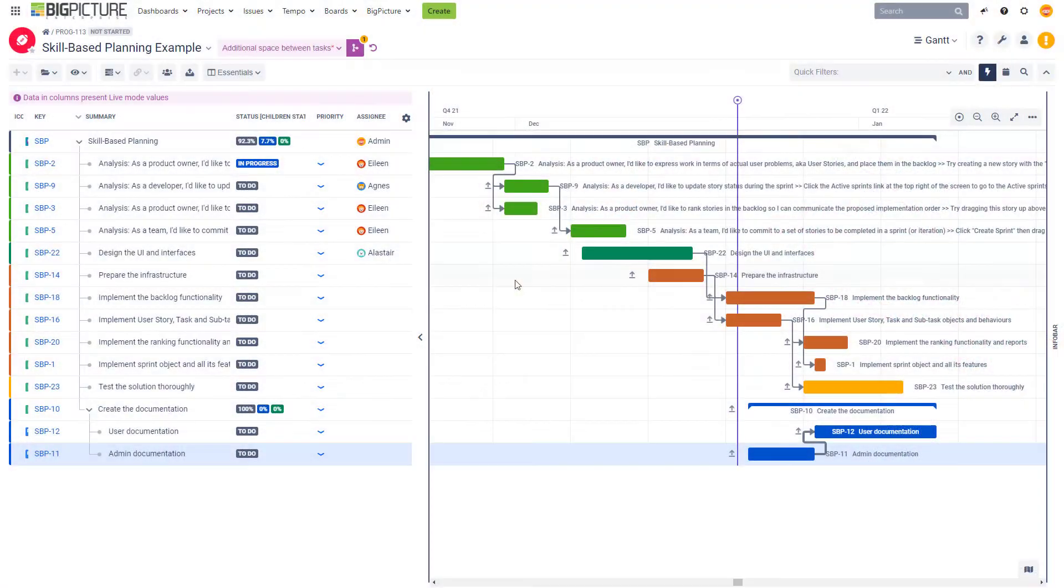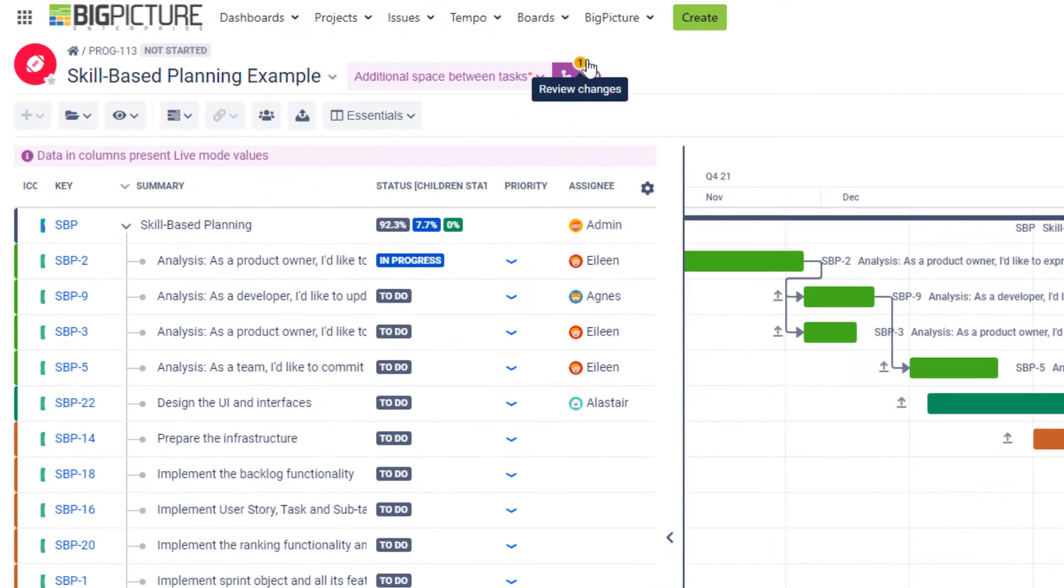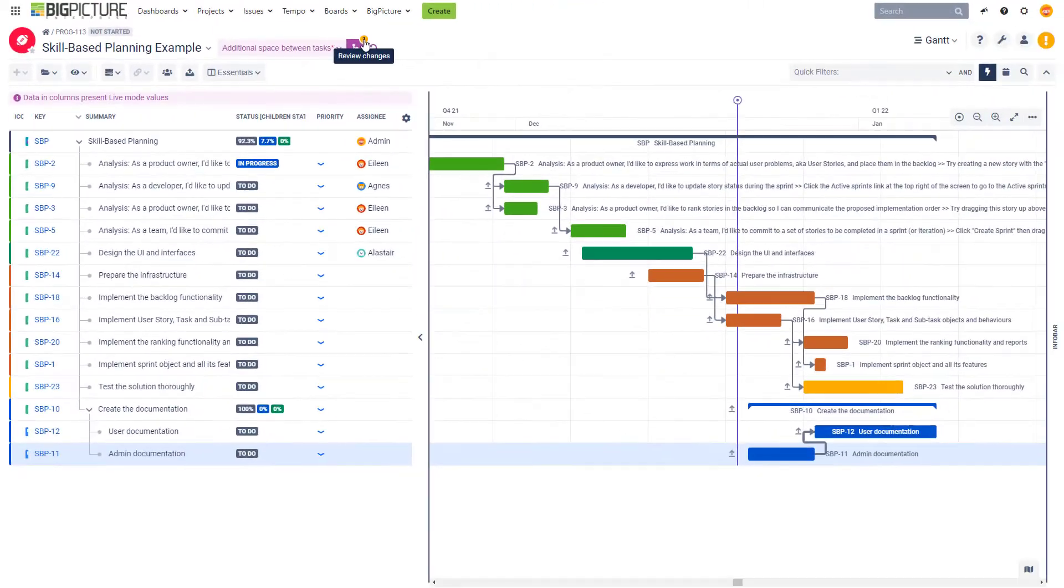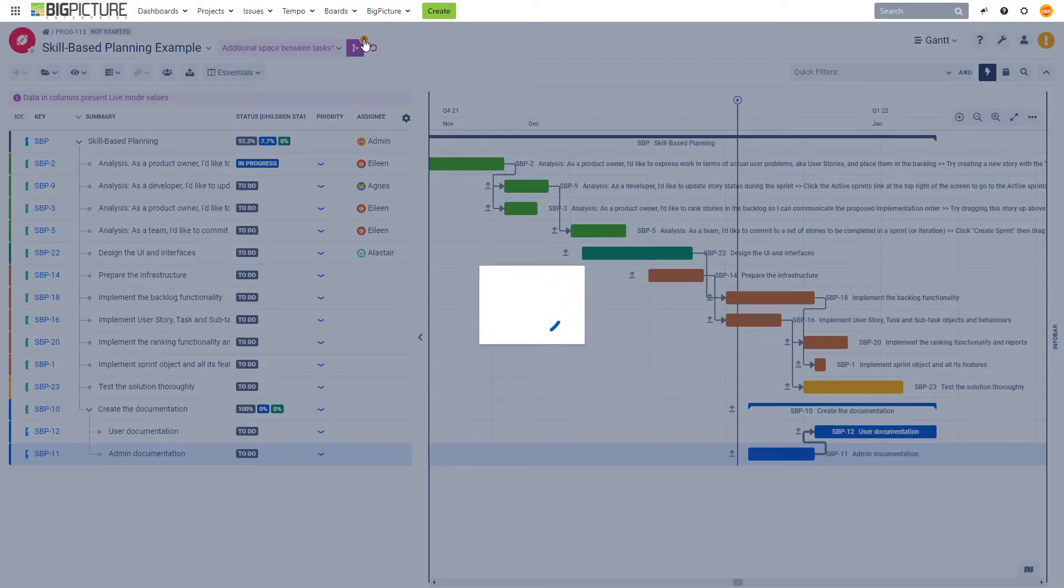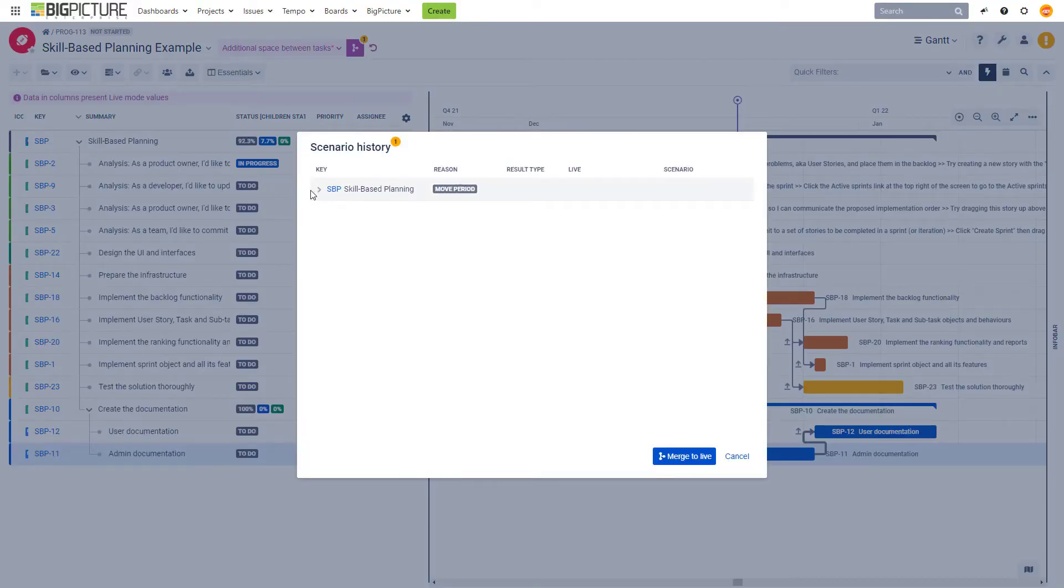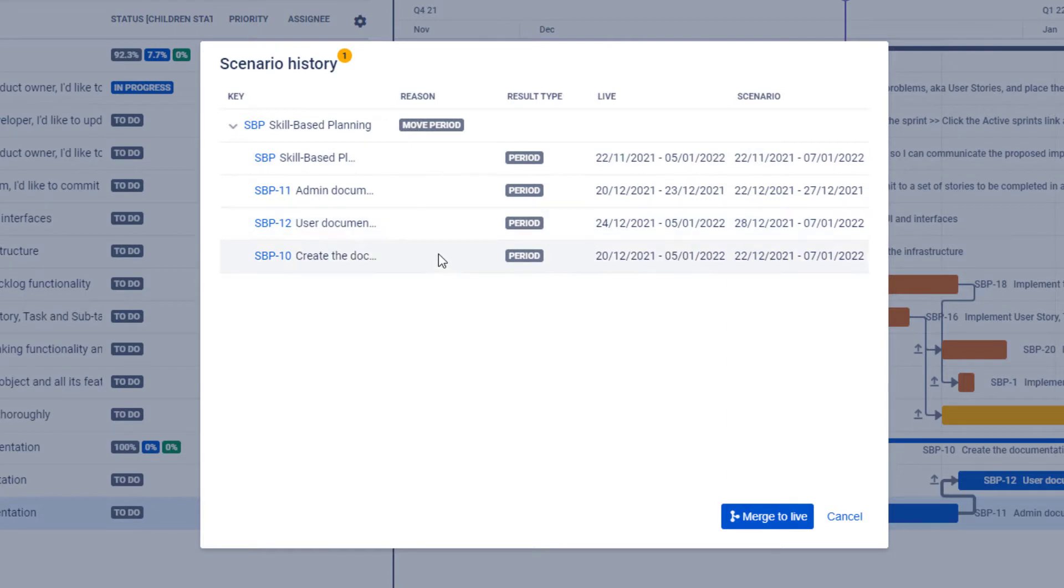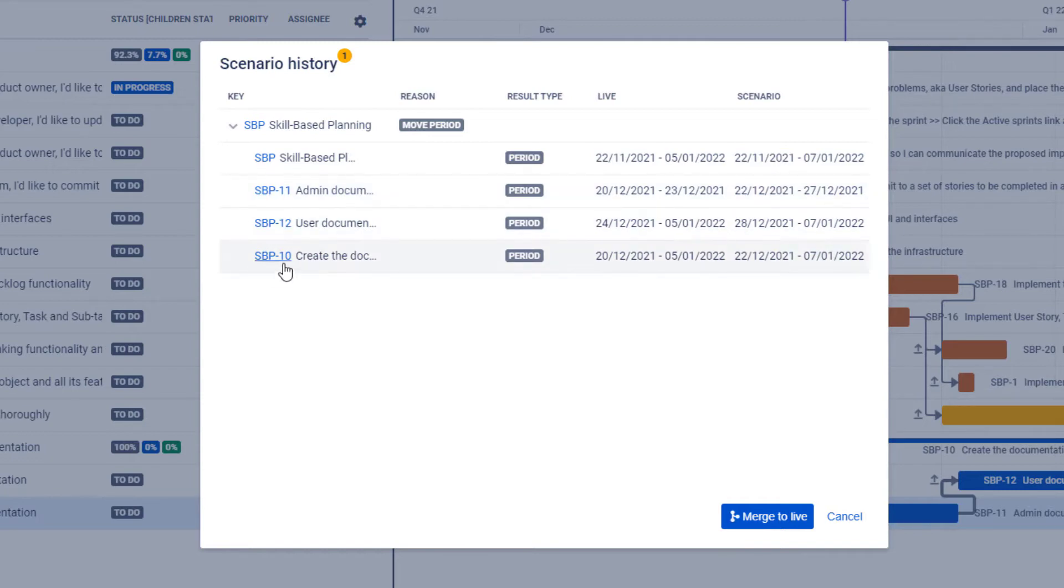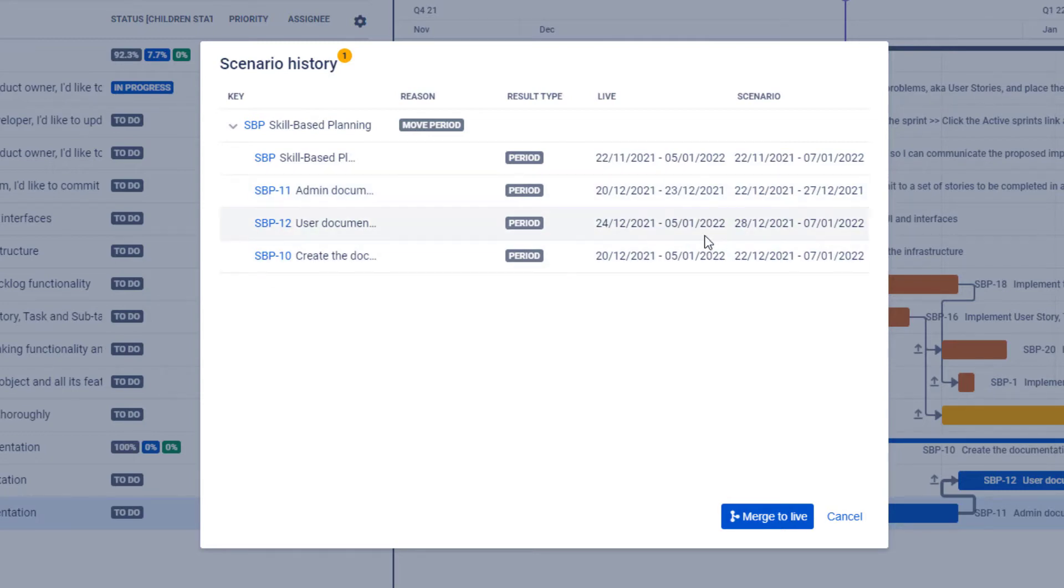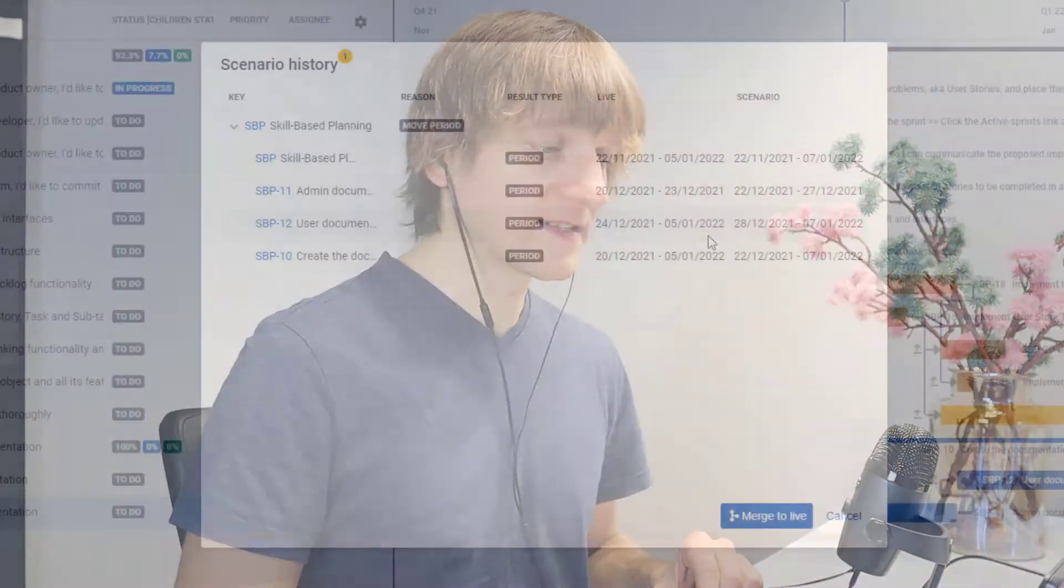So by doing one change, we actually did three at the same time. Now we can see that the number one appears over here, which is an indicator that there has been a change made to our project. We can review that change and see what has actually happened. We can expand this change and see that there are four entries that have been modified. We can immediately see which tickets have been modified, what the modification was—basically which dates changed into which dates—and thanks to this, we can understand exactly what has happened.